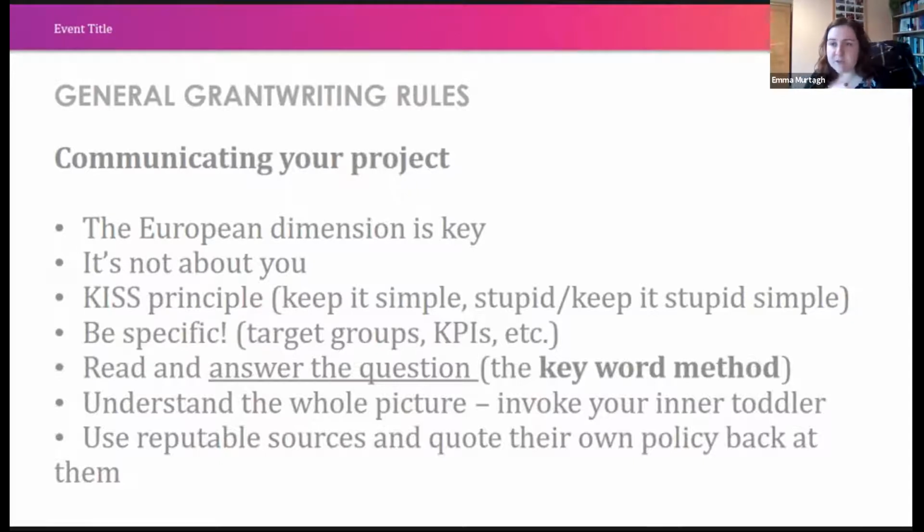There is a thing that people do sometimes, usually in project management, but it can be in project design as well. It's called gold plating. It's where they get an idea and it's a great idea, and then they get overexcited and they're like, oh, and then we could do this, and maybe we could add this, and maybe we'll add this other thing. And before you know it, you have this kind of Frankenstein's monster of an idea that's just really complicated.